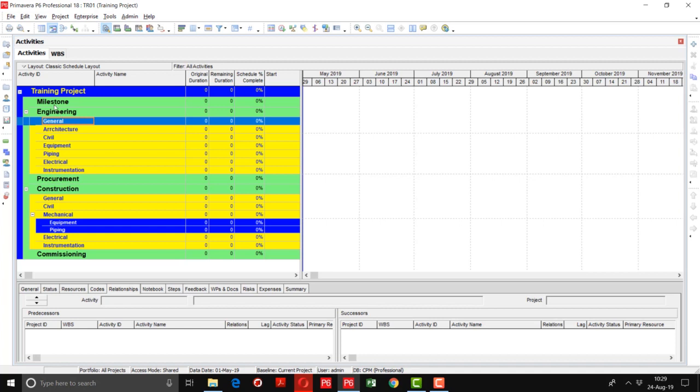You can see that after engineering we have created these six WBS of engineering, after which we will define the activities. These are called work packages. The work package is at the lower level of the work breakdown structure, for which cost and duration can be estimated and managed. Work packages can be scheduled, cost estimated, monitored, and controlled.